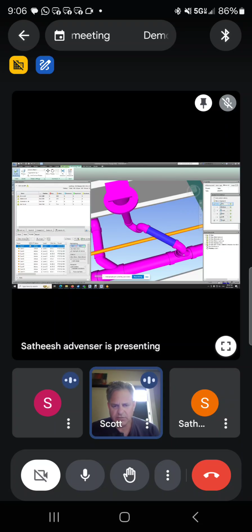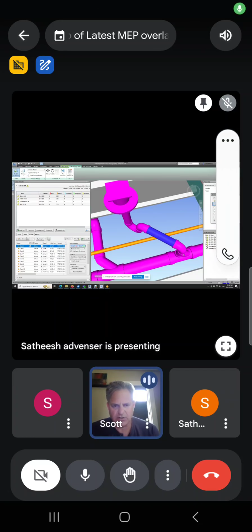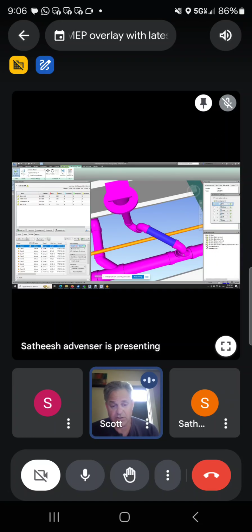when we order the material, we're going to add all those parts lists together. If it was in some kind of an Excel spreadsheet that shows a total quantity, a total length of all the 2-inch pipe, all the 3-inch pipe that we need. There's different aspects, and tell me if I'm boring you with this, but when we go to order it, maybe we have 40 feet of 3-inch pipe and 20 feet of 2-inch pipe, and 5 feet of 1.5-inch pipe. I'm just guessing. That way we order for each unit the total lengths.